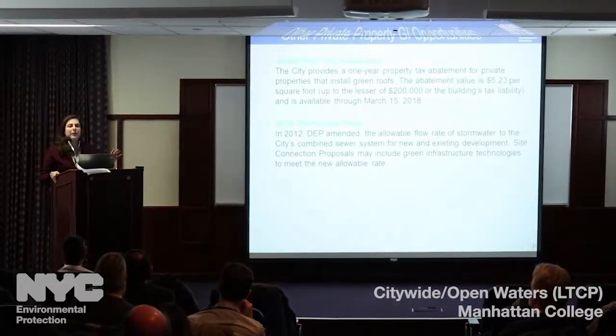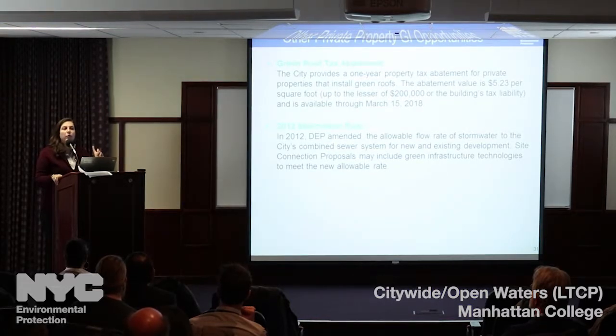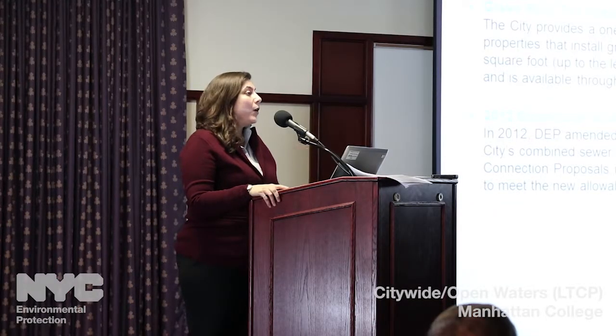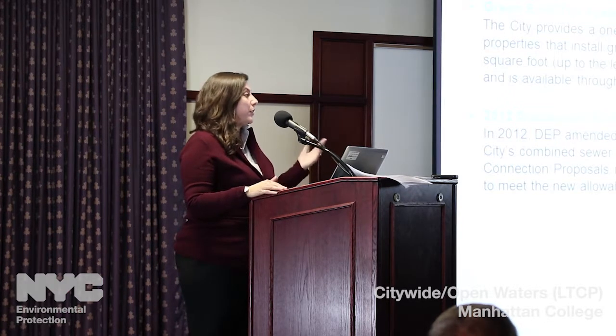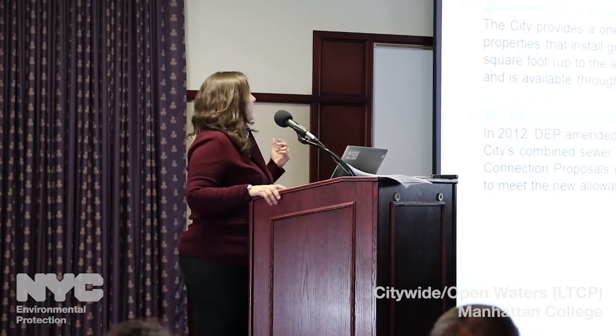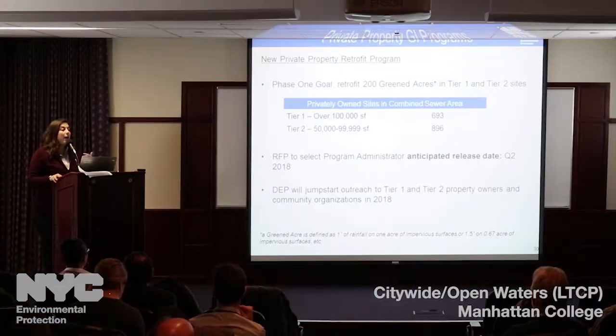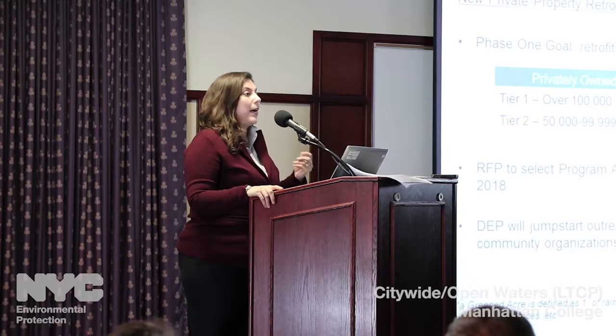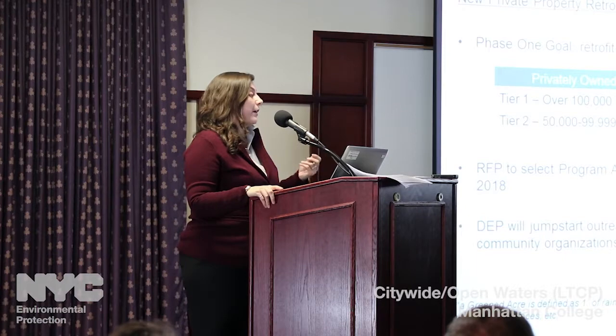Okay. So the question, or comment really, was about how our current green infrastructure grant program has a burdensome 20-year restrictive covenant that property owners must sign to commit to maintaining and keeping that asset on their property. We agree with you. I think that's the largest reason why our numbers for that program aren't very high. And that's why we are rolling out this new program that I mentioned. The current program is funded with capital dollars, and so that 20-year restrictive covenant is tied to the life of our bonds. It has to match the life of the asset. And that has been a problem for private property owners.